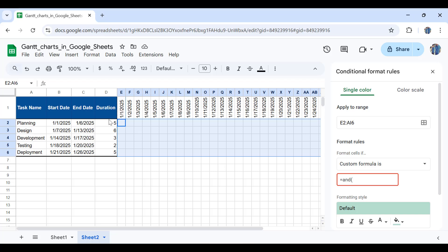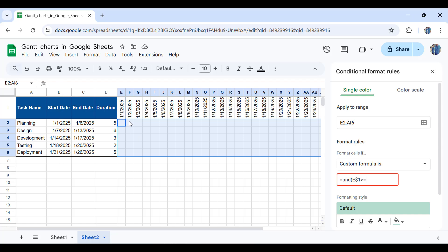Basically, if this date is greater or equal to this date, and also the same date is smaller or equal to this one, then the conditional formatting should be applied on that specific cell. Otherwise, it should be left blank. I'll write down E and then make the row number absolute by putting a dollar sign, write 1. If this is greater or equal to the start date in B2, I'll lock the column number. Since we're going to drag it to the right, the column number for the start date shouldn't change. So I'll put a dollar sign in front of the column name and write down B.